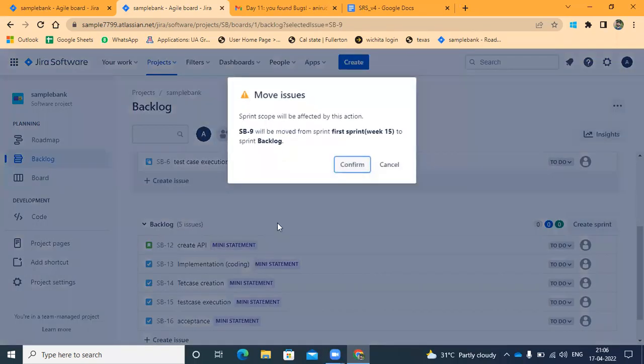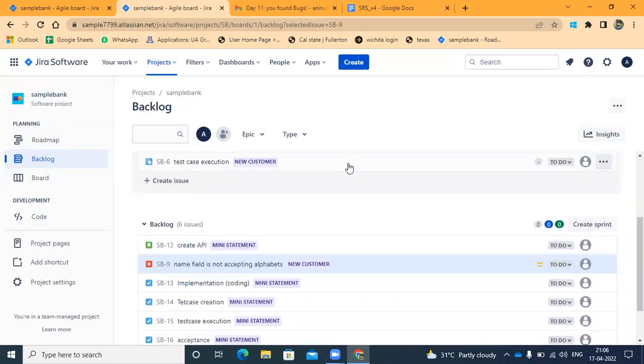Because that sprint is completed, but that issue was not fixed or checked in that sprint, whenever they create sprint 2, they will upload this to sprint 2. It will be forwarded to sprint 2, and in the second sprint they will take this up. It depends upon the priorities. They will take the issues, tasks or stories from the backlog to the sprint.